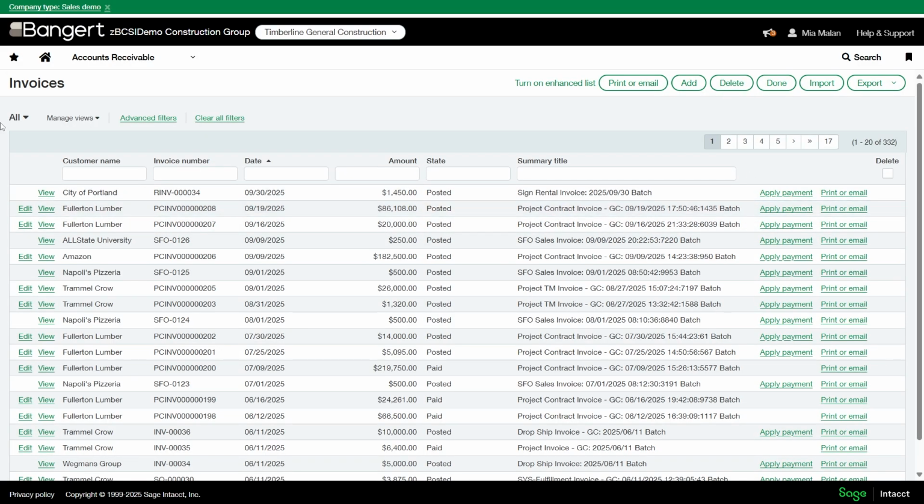So you can add a filter here if you'd like to see batches that have been processed or unprocessed. Once this is configured, you can incorporate this into your monthly review of retainage release details into your project, and you can also use this for closeouts or reconciliation processes.